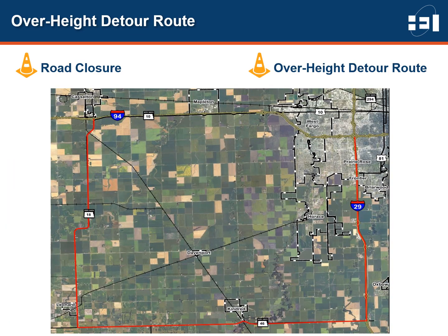The project is anticipated to be constructed in a single phase in which the road will need to be closed to all through traffic. The existing bridge has an existing inside 24-foot clear width, so phase construction for the bridge deck overlay will not be possible. Specific timelines on the road closure will be set to provide for the least inconveniences for the traveling public.